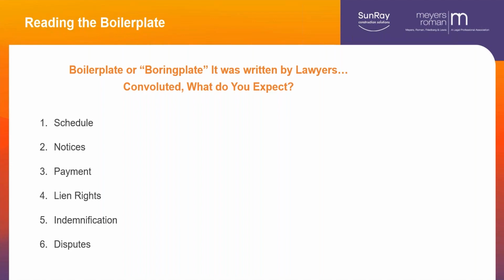I mean, it makes sense that if you do something and somebody gets hurt or the property is destroyed, that your insurance ought to pay for it. So that's going to kick in. But what if it goes further than that and it now talks about indemnifying for contract breaches? No, you don't want to indemnify all these people for contract breaches because one of the keys that's going to kick in is who's going to pay for the attorneys for each side when you're having this dispute.